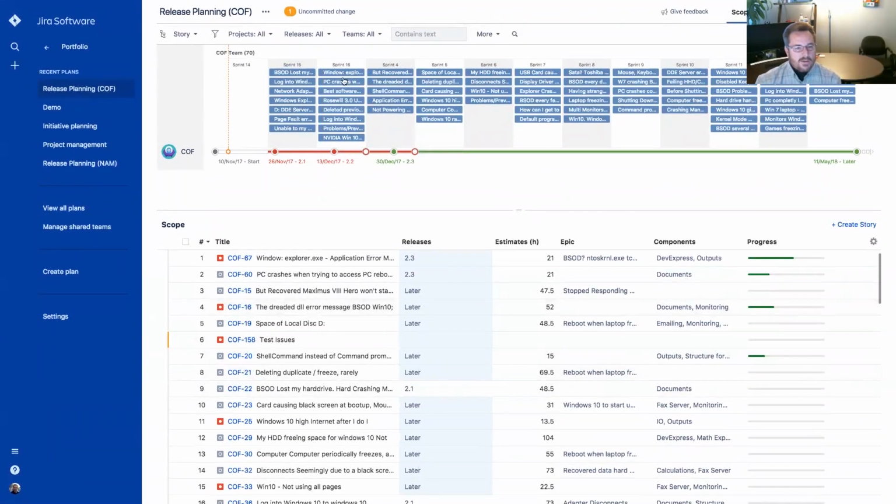You can see I made a change, so there's an uncommitted change, and it goes back into JIRA. So that's an important idea and can sometimes be very difficult for people to grasp, because it's very possible within Portfolio for you to tell three of your project managers, hey, take our list of projects, go work with our staffing levels and see what you can do with our schedule. And as long as they don't have the right or the ability to automatically commit those changes, you can take a look at the three scenarios and the three options they might come back with, and then decide which one you need to have implemented. This is actually a fairly powerful idea.